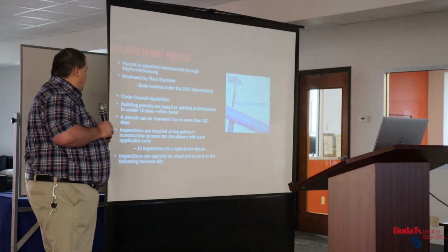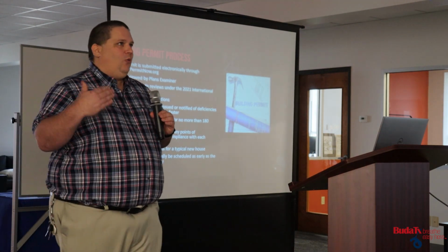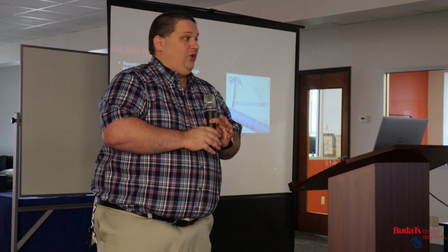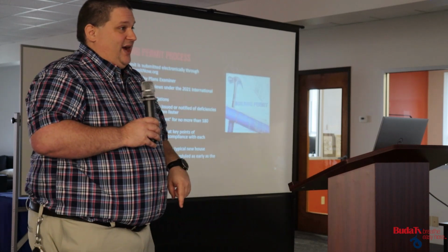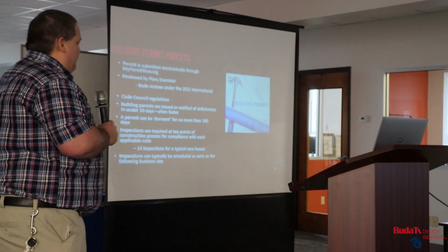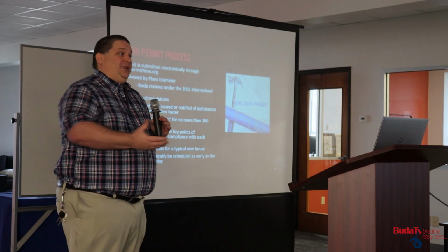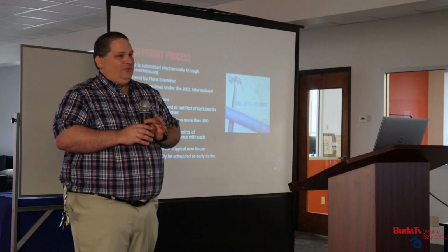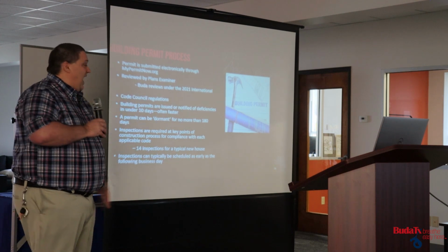Inspections are required at key points of construction, and you want to make sure you're aware of what is needed in what order. That's why we have them broken up into categories on the My Government Online portal, because if you do electrical work, then put the sheetrock up, and we have an electrical inspection, that sheetrock's coming down, because we have to do the electrical inspection. So you do need to make sure that all of your inspections are carried out. We have had situations where people didn't do rebar inspections and poured concrete, and the concrete's got to come up, and you don't want to get yourself in that position. Everyone needs to make sure that they keep on top of their inspections.